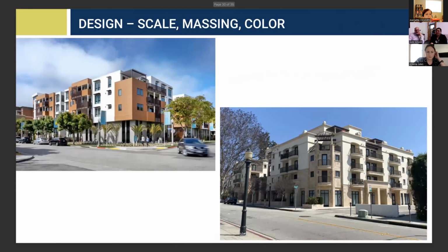This one, the one in the upper left, also had at-grade parking and above, kind of a modified wrap project. This is because the water table in Playa Vista is only like 9 feet below grade, so we really couldn't go down any. So I think it's about how you treat the exterior, but really every developer avoids going underground. It's probably the third rail of most projects: can't go underground.